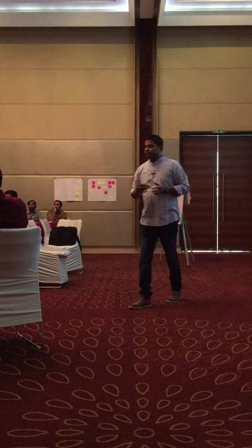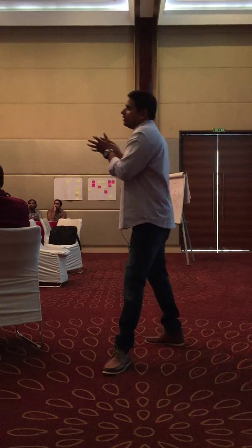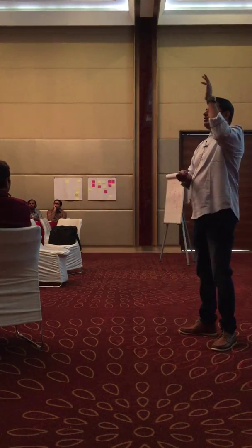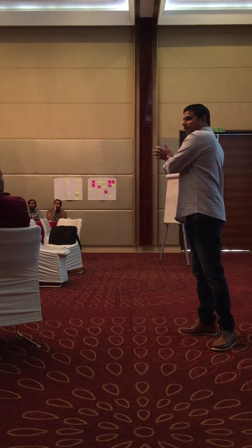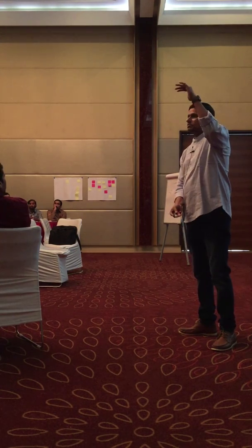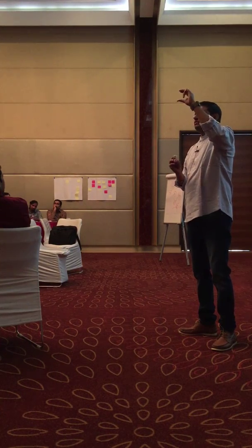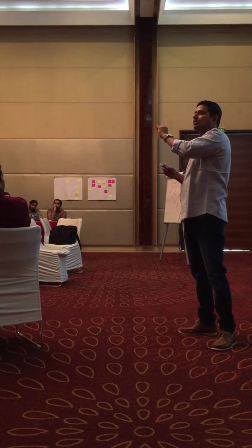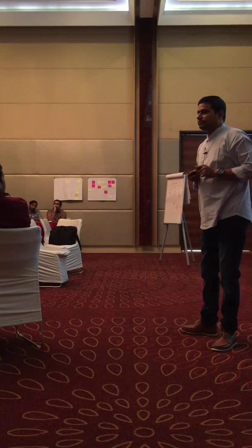We will do that. What is the difference between product backlog and sprint backlog? Sprint backlog is a small subset of the product backlog, which you will take and complete in a particular sprint. Suppose 100 items are there in the product backlog. In my sprint, I am taking the top 3. Those 3 will be part of the sprint backlog, which contains the tasks also for each story.